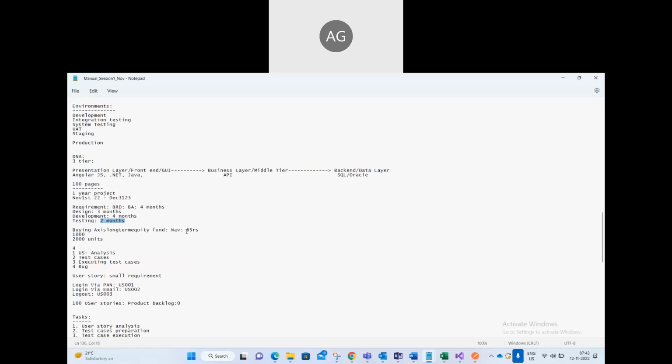In the waterfall model, only one time. We are not doing any parallel work. One phase after another phase. First phase, 4 months, then design phase, 3 months. Once requirement analysis for all the web pages is properly done, only then we go for the design phase. Once the design is done, only then the development phase. Once development is done, only then the testing phase.